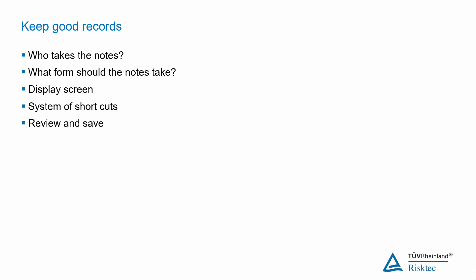As an experienced facilitator I always make sure I do two things with my workshop records. First I will quickly read through them immediately after the workshop to add in any missed details before they disappear from my memory. Secondly I will always save the rough copy of my notes exactly as they were recorded in the workshop and then do any tidying up of the notes on a separate copy of the file. That way if there is any confusion over what was said exactly in the session I can refer back to the rough as dictated notes.